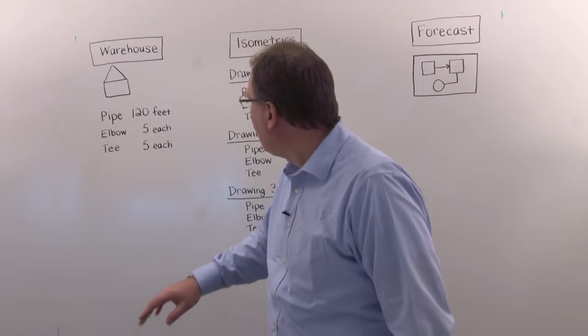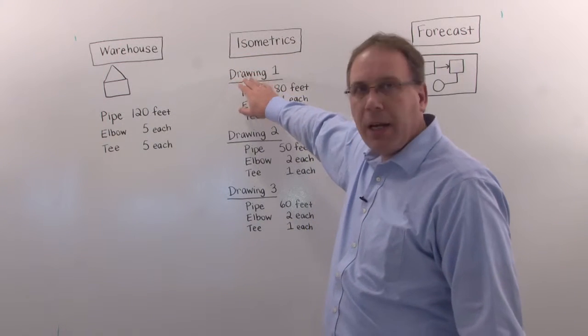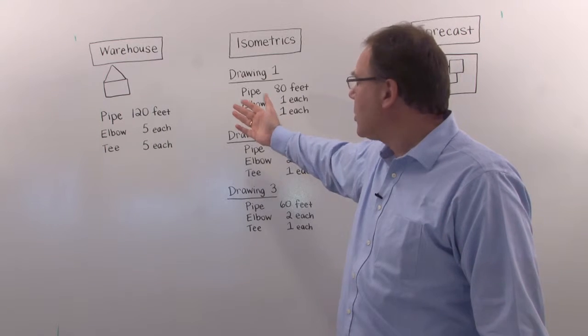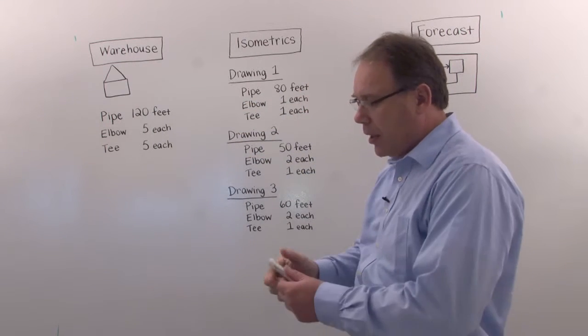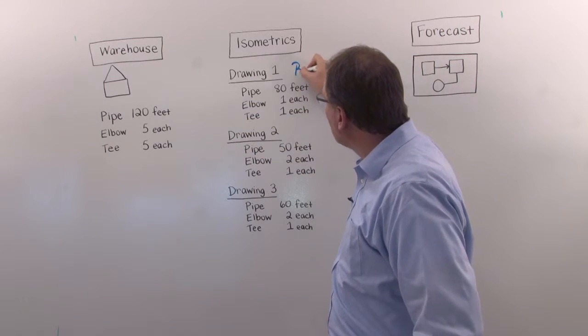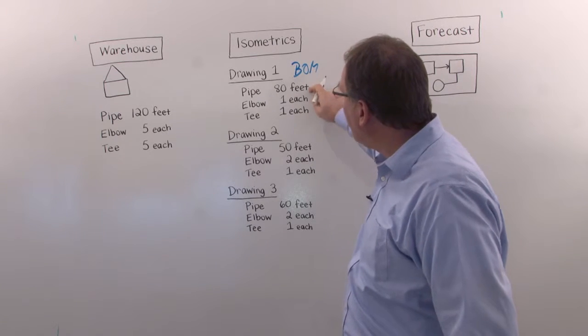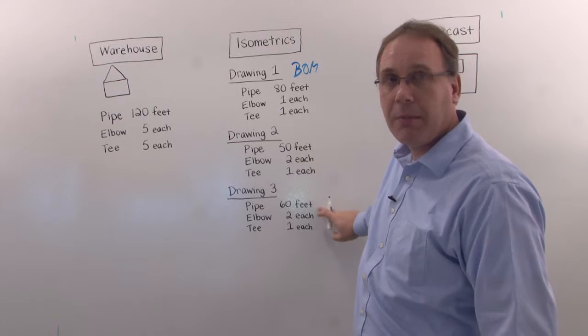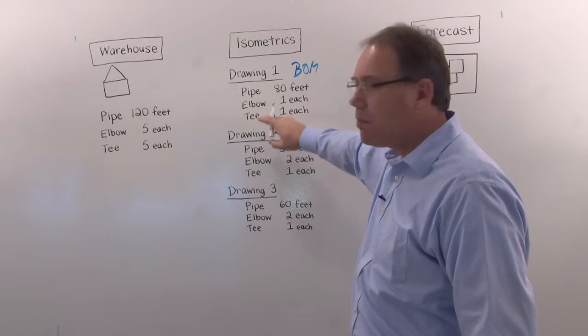Now engineering obviously is building drawings, created drawings called isometrics. These isometrics, I can write this down, bill of materials. So that's a bill of material of an isometric, number one, number two and number three. And requires this material.